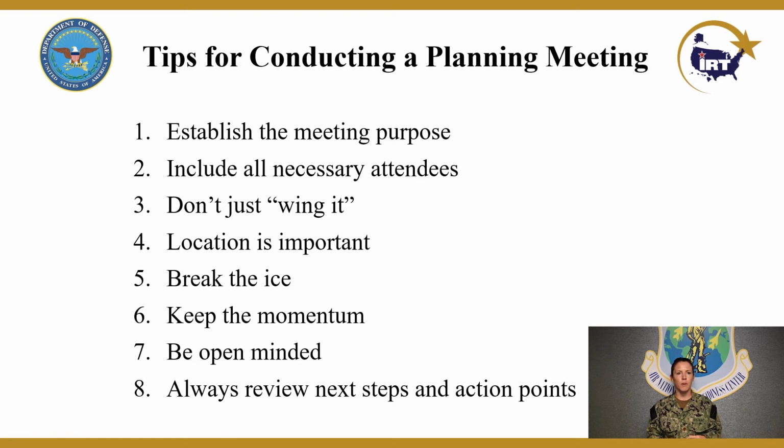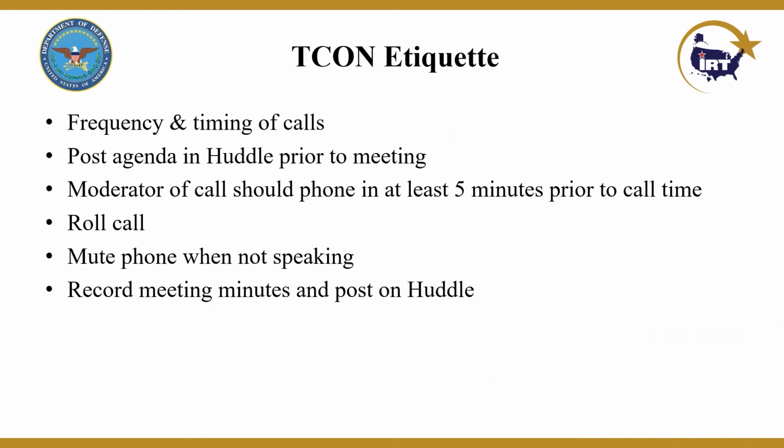So this will be for whatever meeting you conduct, whether it be an IPM, an MPM, an FPM, or if you're doing it via Zoom, or if you're having a TCON, always end your call with what's next in your planning process, who needs to provide that information, and then when the timeline is to get that back to you as the lead planner. Next slide.